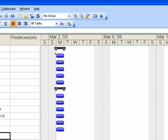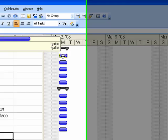In the Gantt view, Project offers three ways to link tasks to demonstrate sequence constraints. In the chart on the right, you can click on a taskbar and drag to the successor task.